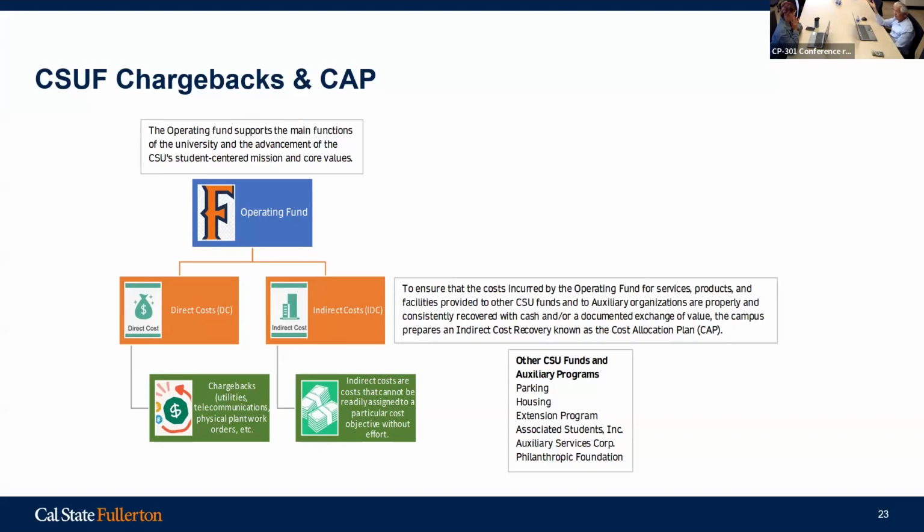They're building a new building now, phase 5, I think. That's a capital project. So we develop a very complex pro forma budget for it, extending 12 years, and that includes all the direct costs and projection for debt service.